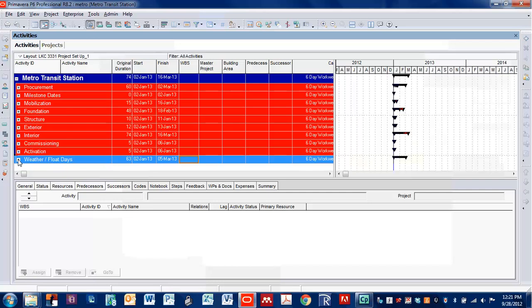Just put it in. Remember to follow the sequencing. Do all your activity names first, then do your durations, okay? Then do your linking, then do your codes. If you have a system, I promise you, you will not get lost, and it will make it far more enjoyable to set up a schedule.